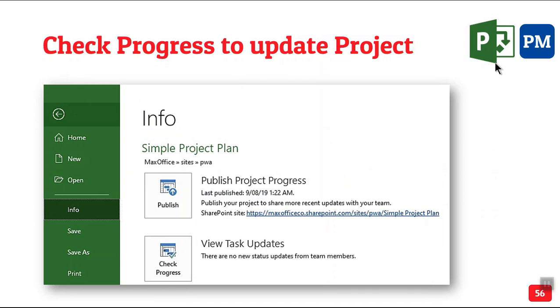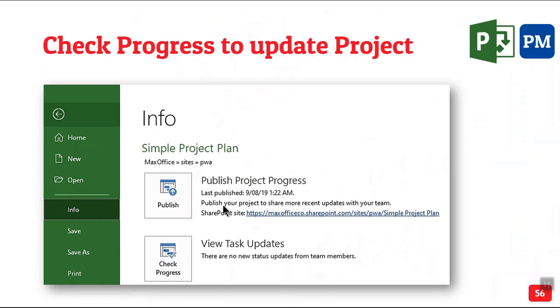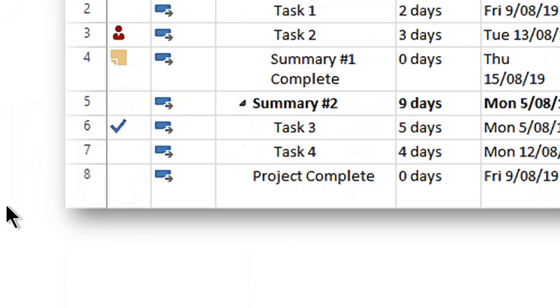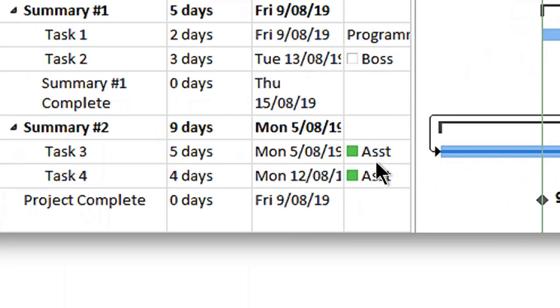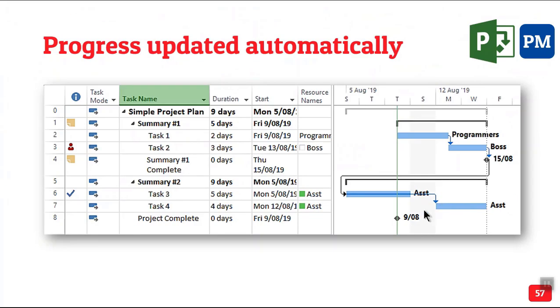For that, you have to open the project on desktop because the project desktop has a very sophisticated project management calculation engine, which is not replicated on server. So it has to happen on desktop. So open the project on desktop and say check progress. So whatever updates have been approved will be updated. And notice this guy called assistant said this task is done. So it is marked as complete without anybody sending a mail to each other, anybody following up what have you done. And it is lightweight browser based. It can be done from mobile as well. So this is the entire cycle.